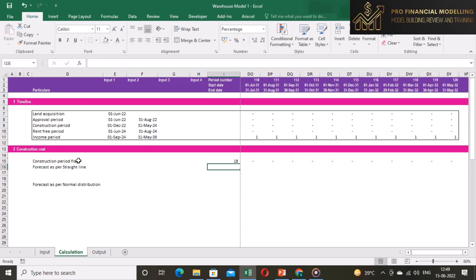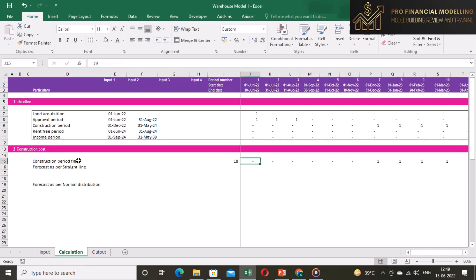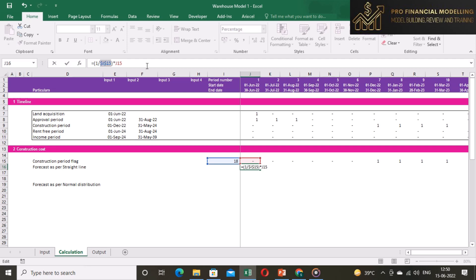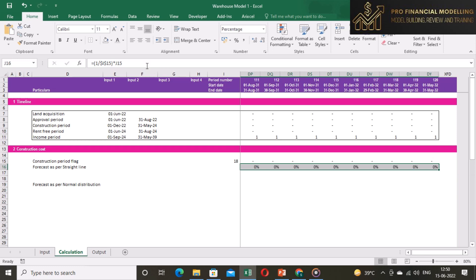Now, calculate the sum of construction period flag in column I. The forecast of construction cost as per straight line will be 1 divided by sum of construction flags and multiplied by construction period flag. Freeze the total of flag and copy it across.